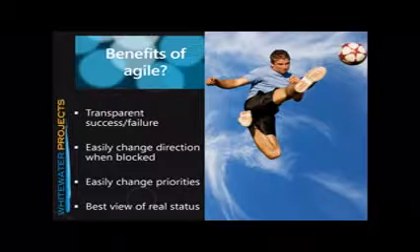In a traditional waterfall approach, I ask this in classes all the time, how long would it take to change that? 6 months, at least, to make that kind of significant architectural change, and then change all the specifications, and then go change anything that you had written, or probably throw it away and start from scratch again. It took us 2 weeks because we were taking an iterative and incremental approach with loosely coupled modules. Our stories were loosely coupled enough that we were able to get rid of all the ones that were associated with that backbone, replace them with a much lighter weight approach, and move forward in 2 weeks.